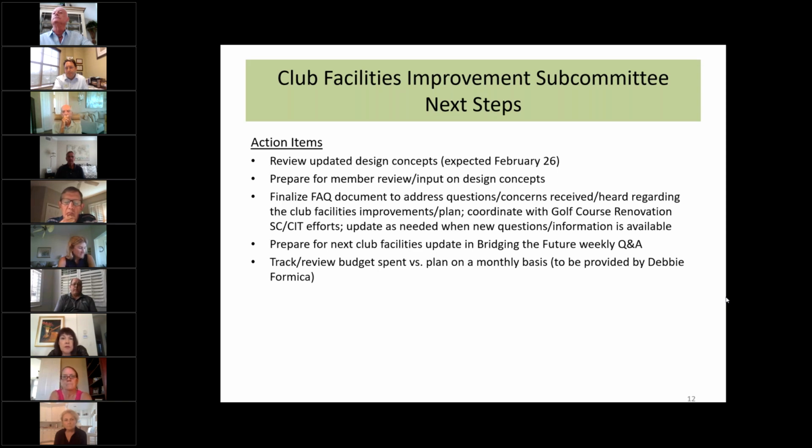I think after we have our update next week, it may be our turn the following week to do the Bridging the Future Q&A. So we'll prepare for that. And then, we're going to see the January numbers this week or at the end of this week, but so far we are on track. Actually, Jeff told me that in December we had underspent what would have been projected through that time for the project. So we're on track to be within the budget that was approved by the board in October.